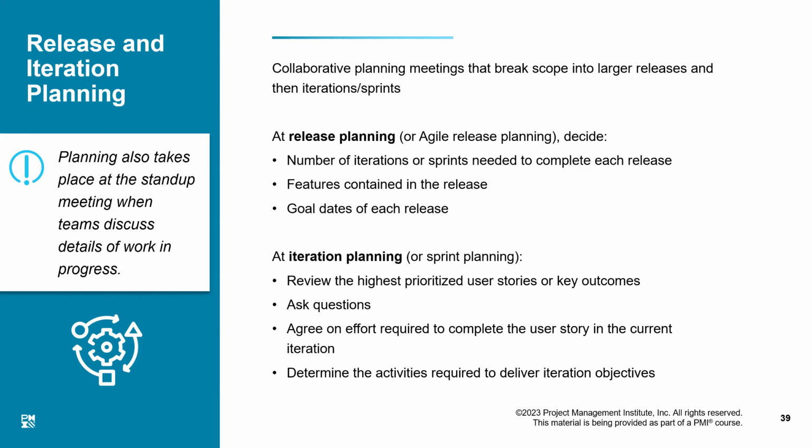Maybe in this project, you have the iteration size fixed to 2 weeks. In another project, it is 3 weeks or 4 weeks, right? It can very much be possible. But as I said earlier, when you have decided the size of the iteration to be, say, 2 weeks, then nothing can change it until the project is done. No matter what you are doing, your iteration size will always remain 2 weeks.